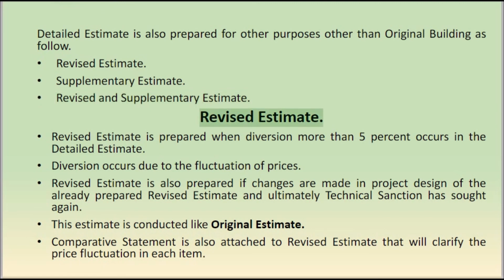Revised estimate. A revised estimate is prepared when a diversion of more than 5% occurs in the detailed estimate. Diversion occurs due to the fluctuation of prices.